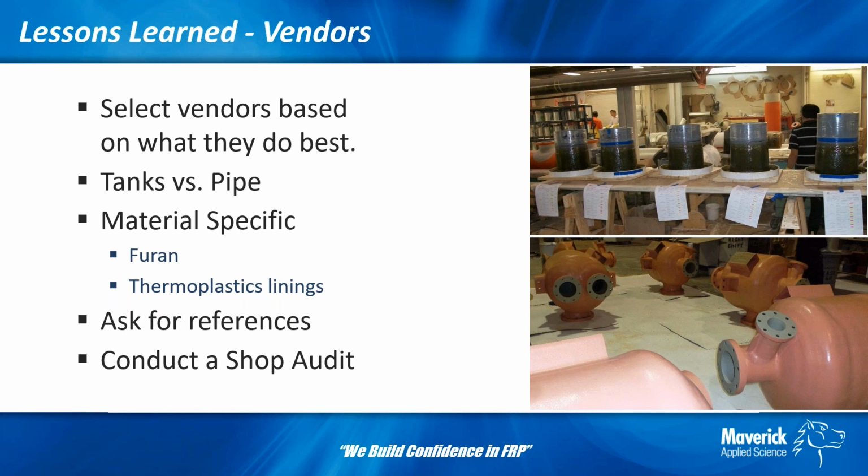And then we always say, if you're evaluating manufacturers, ask for references, and particularly, we're talking today during the COVID period we're going through. Everybody has had their challenges. Everybody has had to adapt. Every company and every manufacturer, we gain talent, we lose talent, we have our own trials and tribulations, and you need to audit them and go visit them and talk to them and see who's doing the work. How long has their shop manager been there? Have they had any turnover? Those sort of things, just so you know that they have qualified people at every seat.